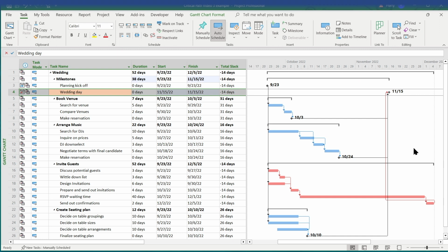This causes an issue when looking at it visually, as our discrete tasks actually go further out to the right than our milestone. There are reasons we might use this idea of physically holding a date, which I'll discuss in a later video, but for now, the deadline is the preferred option when running critical path analysis to a milestone.